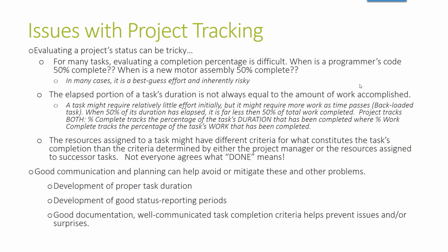Project tracks both. Percent complete tracks the percentage of the task's duration that has been completed, and percent work complete tracks the percentage of the task's work that has been completed. They're not necessarily the same thing. That's an important concept to understand.